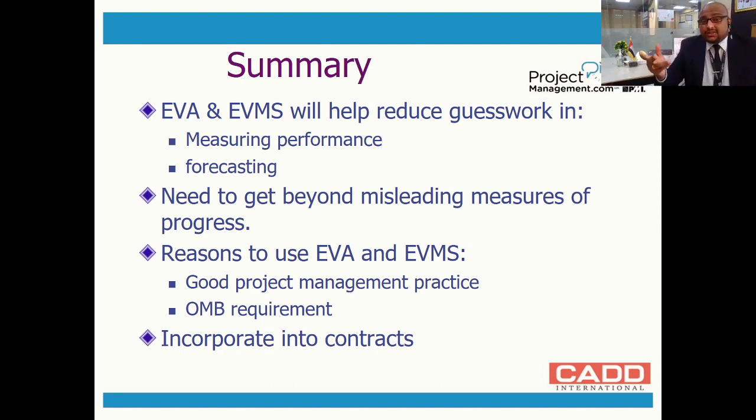It also can be incorporated into contracts because, if you are in a contract, you have limitations and you are under constraints, and this will help you ensure that the constraints are achieved as per the scope of work. You are not being pushed too much against the wall with this contract because you have this measurement tool which will show that because of this reason you have the delay, so that you have a point where you can put up the claim saying that this was not my mistake, so this has to be rectified. The claim has to be appealed.